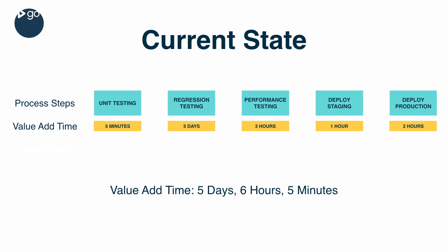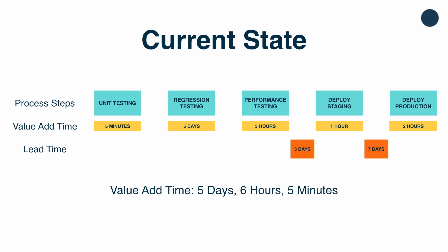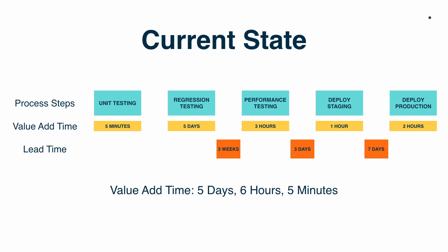Going back to our process map, we now need to measure how much lead time is required for each step. Once we dig in, we find that the team responsible for doing a production deployment has a seven-day backlog. It's the same type of situation for the staging environment, but since that's not as risky, they can cut down the time to three days. When we talk to the people who run performance tests, we find out that it takes three weeks to get all of the systems required for those tests set up.